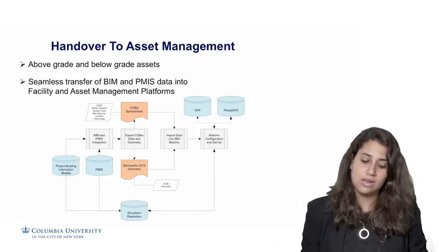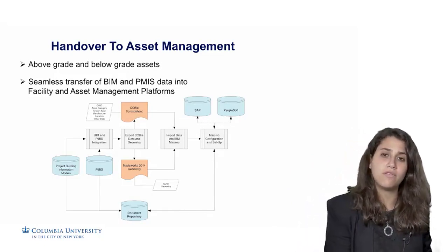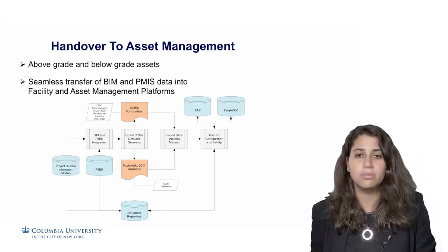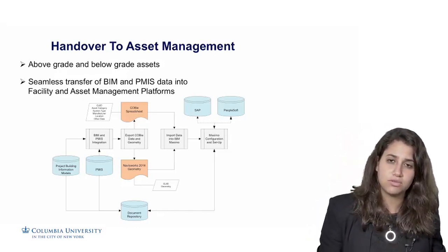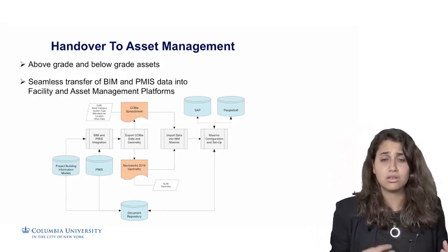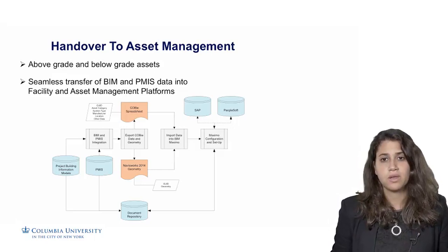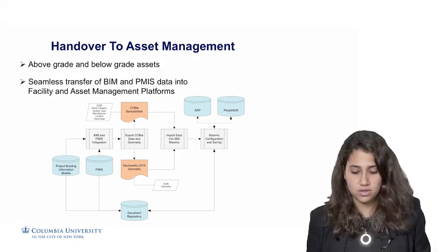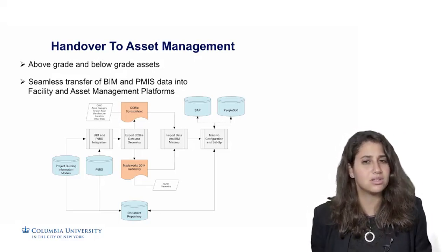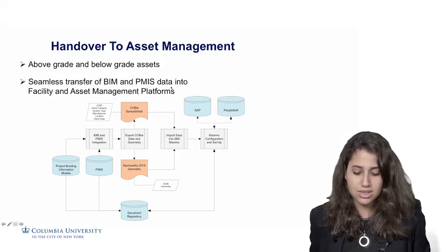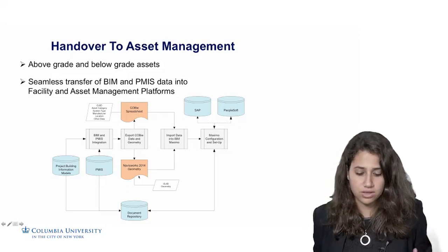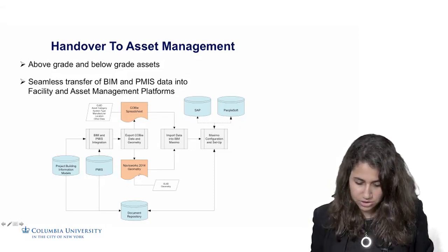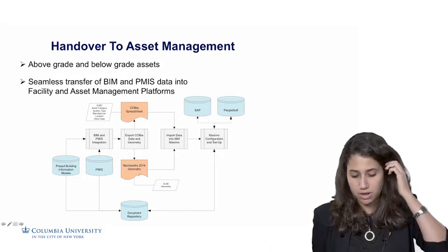What do you need? You need to transfer information from the BIM environment, as I mentioned. There's a lot of technology out there. It's not only BIM. So there's also project management information systems that house the documents, the submittals, the O&M manuals. All of these have to be transferred. So this is a sample workflow. It does not have to be done this way, but this gives you a flavor of what it really looks like to transfer the information from a BIM environment and from the PMIS.